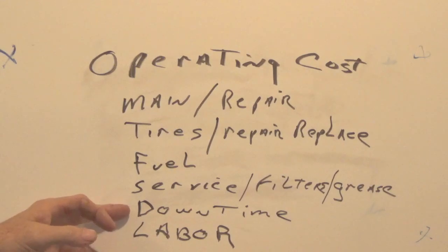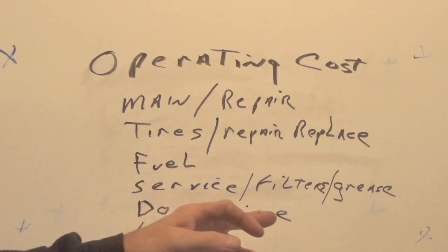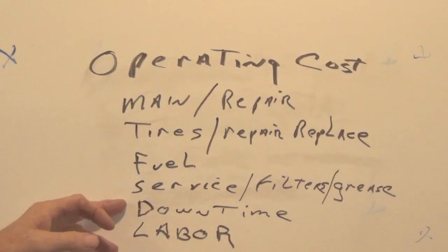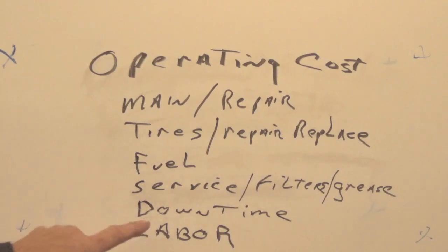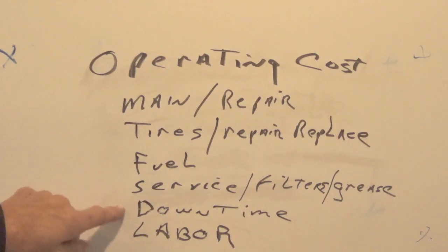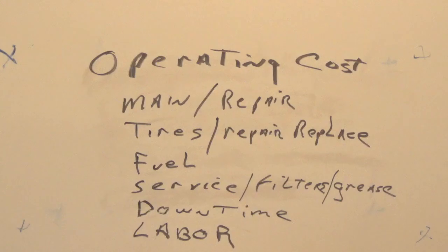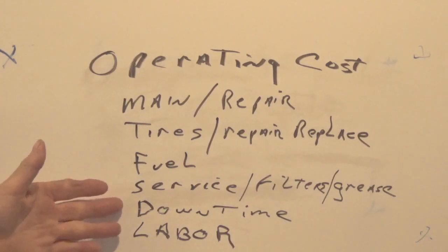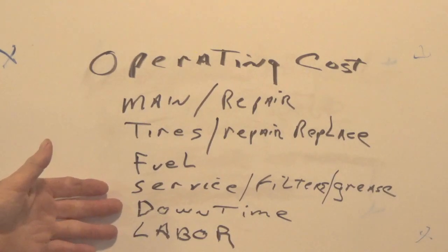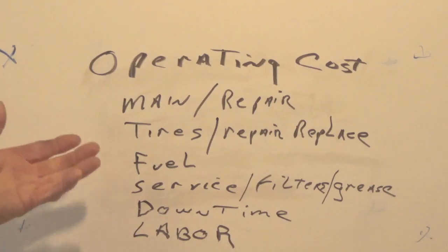But if the people are going to aggravate you by telling you, well, you're not allowed to charge me all day for this truck, but yet the truck is sitting there and that's part of downtime, I need to consider that, because whether you like it or not, that truck has got to be paid for. I mean, they have a thing when you buy heavy equipment called skip payments for the winter, because usually, especially in this neck of the woods, sometimes the winters, and I'm sure there's other places that are worse, winters will shut you down with heavy equipment. And they still have to be paid for.